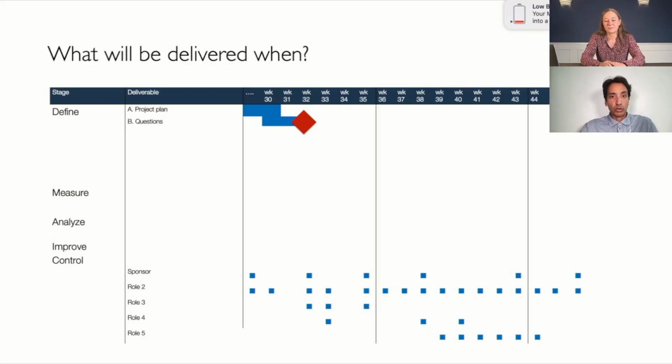So if you are in the define phase, and you would say, okay, let's pull data or let's look for data. Now, if it's there, then we can assess a sample. And if the sample is good enough to continue, then these two checks on the checklist make sure that we can move to the next phase before we actually invest a lot of time to get the full data set, for example.